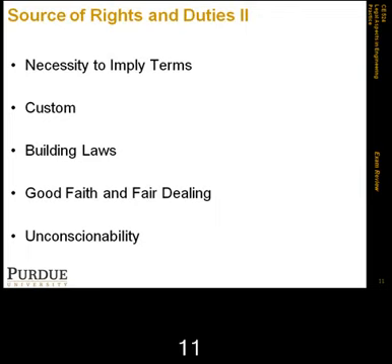And for example, one good example of that was a case of a subdivision purchase agreement that barred the parties from going to litigation, and basically set up special arbitration proceedings. That particular clause was viewed as unconscionable and was stricken by the court. And the doctrine is probably going to be invoked more often, increasingly invoked in the future.